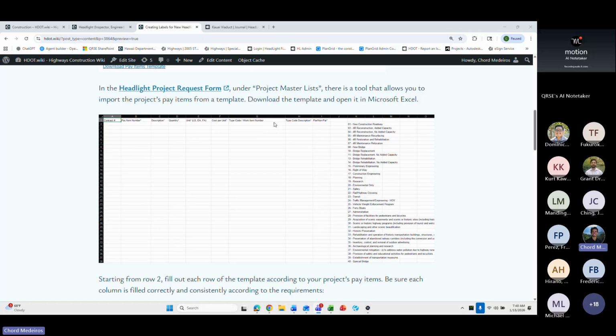to separate them out. So for example, on a federal project, you have type code 21, and then you have the description. You'll look through here and it'll be safety, or 08, and then it'll be new bridge. So this just keeps it clean on the back end Headlight system. And this will allow you to have that summary recap table on your progress statement, and it accurately distributes the funding type codes and the funding distribution.